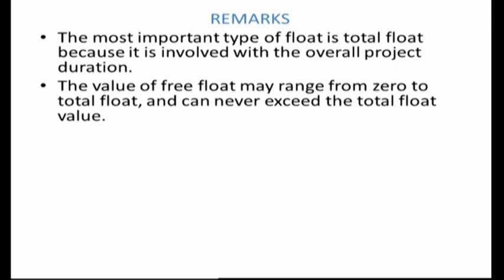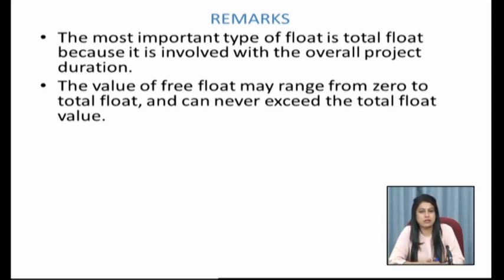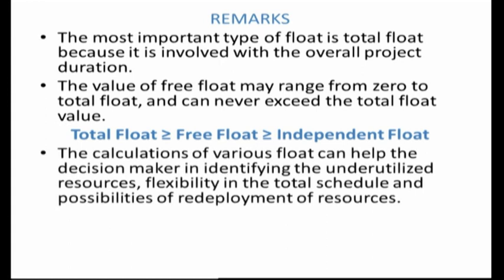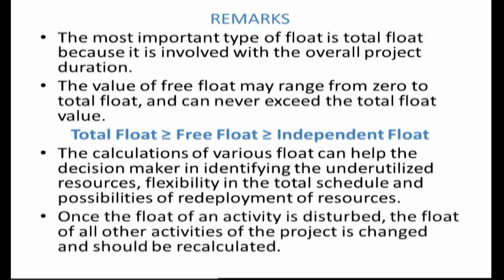The value of free float may range from zero to total float and can never exceed the total float value. Total float is the greatest of all three floats, and free float is greater than independent float. The lowest value will always be that of independent float for each activity. The calculation of various floats helps the decision maker in identifying underutilized resources, flexibility in the total schedule, and possibilities of redeployment of resources. Once the float of an activity is disturbed, the float of all other activities in the project changes and should be recalculated.